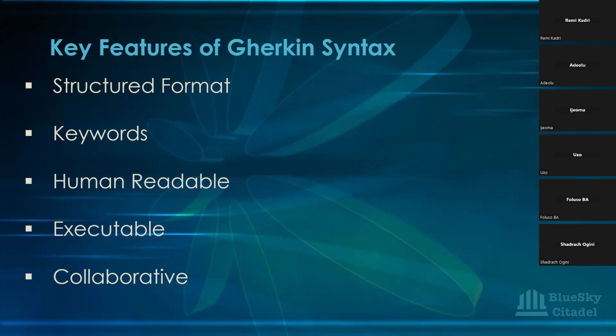So we're talking about Gherkin syntax now. Remember, we've left user story. We understand user story as a I want to, so that. I want to is your action, so that is your benefit, as a is the user. So we've left that. Now we've come to the acceptance criteria, which is the Gherkin syntax. So that's what we're talking about now, the commonly used words within the Gherkin syntax. So given describes the initial context or the precondition. When describes the action or the event that triggers the behavior. Then describes the expected result, and and is the additional information or more details that we want to provide.